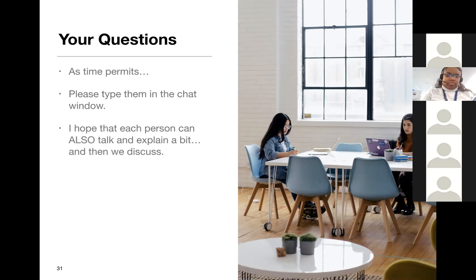Okay. So basically, your questions can lead to a long discussion, but I think that's a little bit of help. All right. I guess the basic takeaway is that we're okay to do it if it's an impediment to help out. But other than that, we should leave the development work to the team. Well, you can put it on the impediment list, and you should help if it's the top impediment, but don't get involved if it's lower than that. Give it to the team or somebody else.